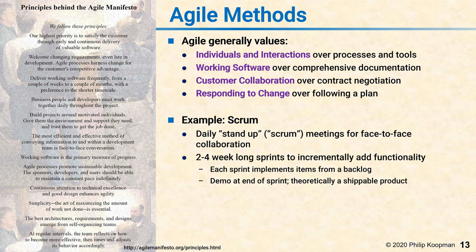So the idea is instead of building everything at once, you get something working, and over time, over each sprint, you add some more functions, and eventually it becomes a minimum viable product, something you can ship to a customer, and then over time you keep adding more functions. And the point of all this is that at every sprint you have the opportunity to notice that a requirement has changed or a new requirement has been added instead of having to go back and redo everything.